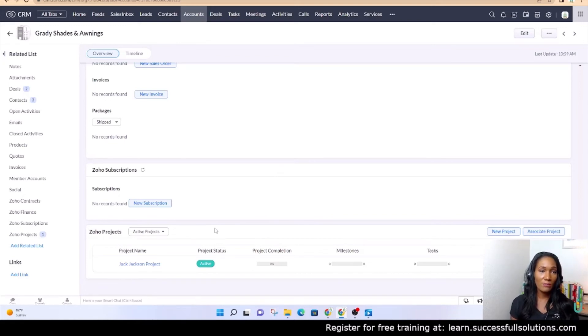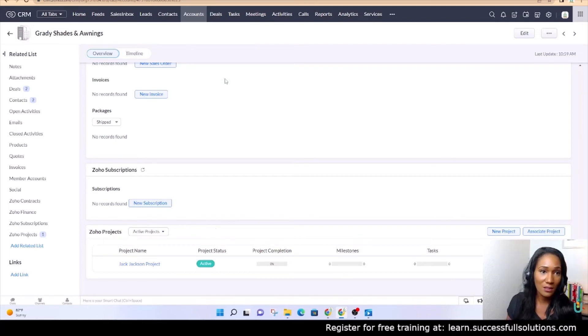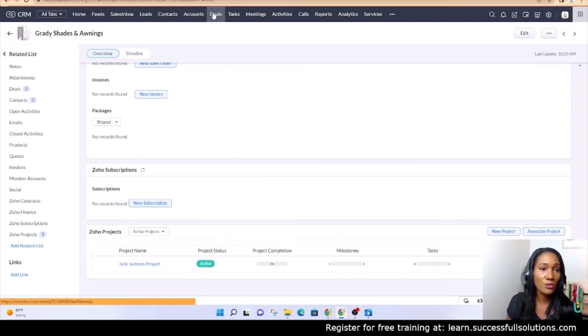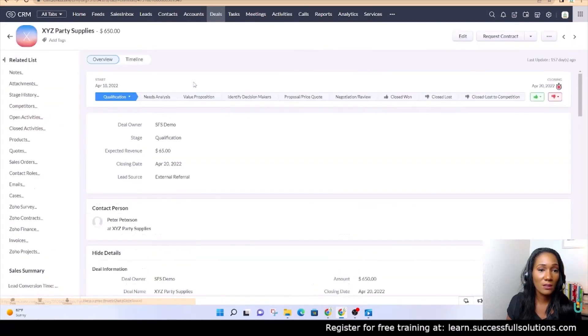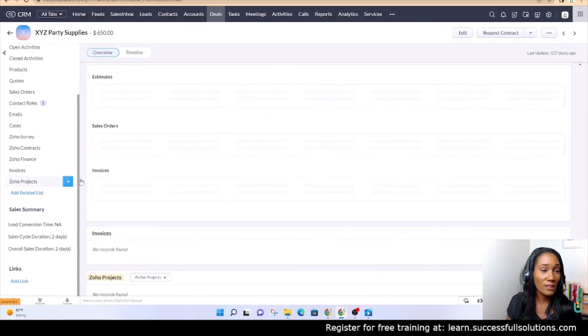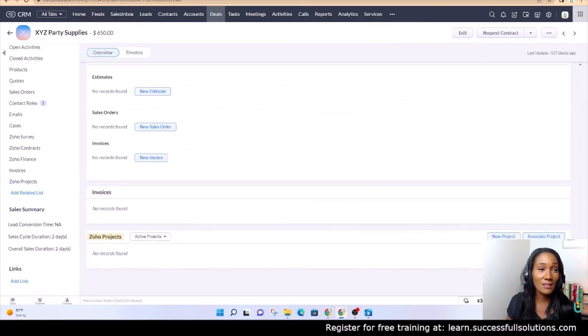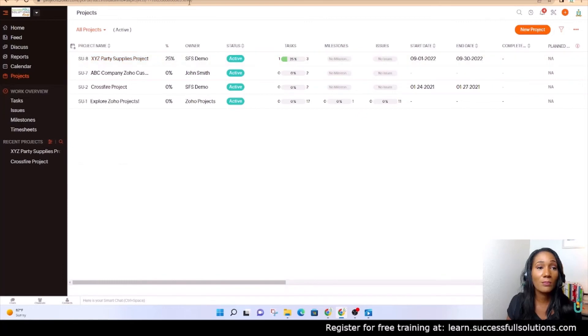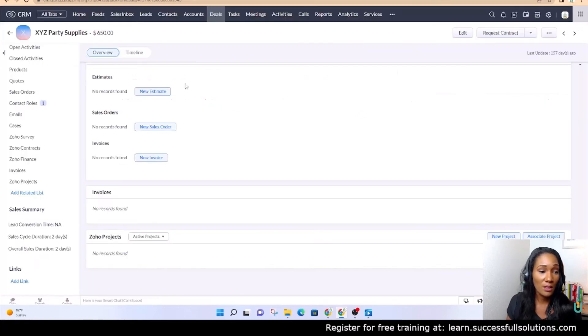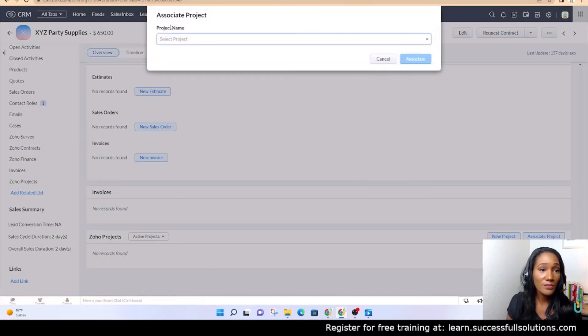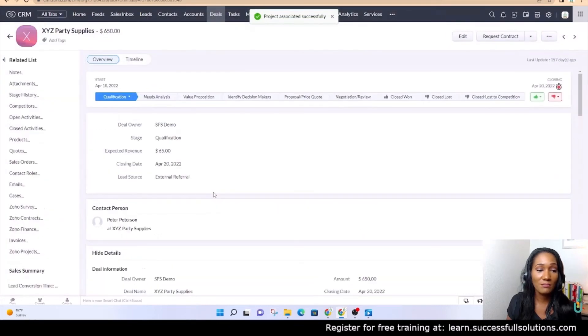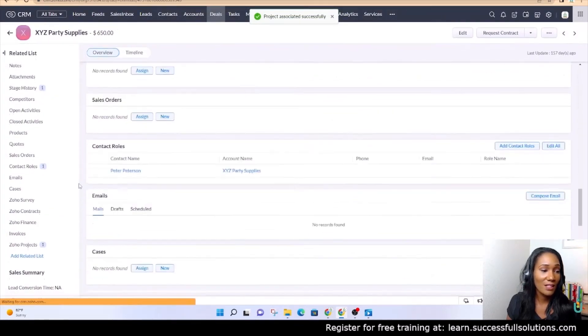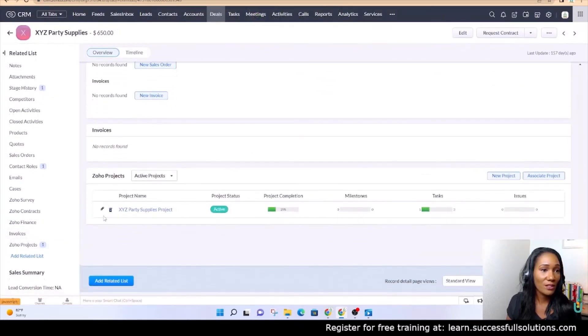So now you know how to add a project from the CRM for an account or deal, but let me show you how to associate one that's already existing. If I go to a deal, XYZ Party Supplies, and I want to associate a project that's already existing in Projects, which is this one, XYZ Party Supplies Project, I'm going to go to the project section and click on associate project. It is going to give me a list, click on it and associate, and that's it.